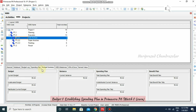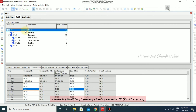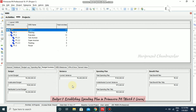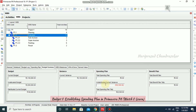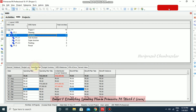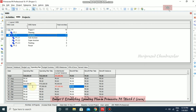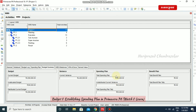For Substructure, going to Spending Plan, I input 15,000 and 7,500. Going back to Project One Budget Summary, you can see the differences accordingly. In Execution, there is an undistributed current variance of 22,500 because we input values in Substructure and Superstructure. Going to Execution Spending Plan, I input 20,000 for one period and 10,000 for another. Back in Budget Summary, the total spending plan tally changes from 25,000 to 55,000 as we also input values in Execution.